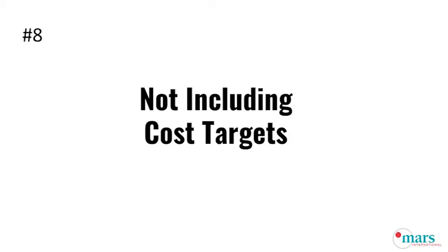You may want some features, and those features may be putting you over budget. And then you can sit down and at least make an informed decision and say, hey, this can go or this can stay, and maybe we need to increase the price of the product or what have you. So getting those cost targets documented as early as possible is very important. When we have customers that don't want to give cost targets and just say make it as cheaply as possible, that always rings a couple of alarm bells for us.